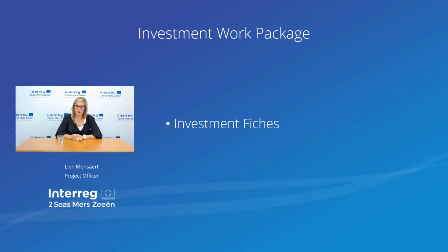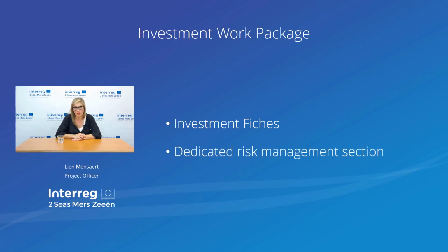In every investment work package, you can have investment fiches. So a fiche will have to be created per type of investment. So per investment, you will have to create a fiche that will detail the location of the investment, the type of the investment, and the output to which you will have to link this investment.